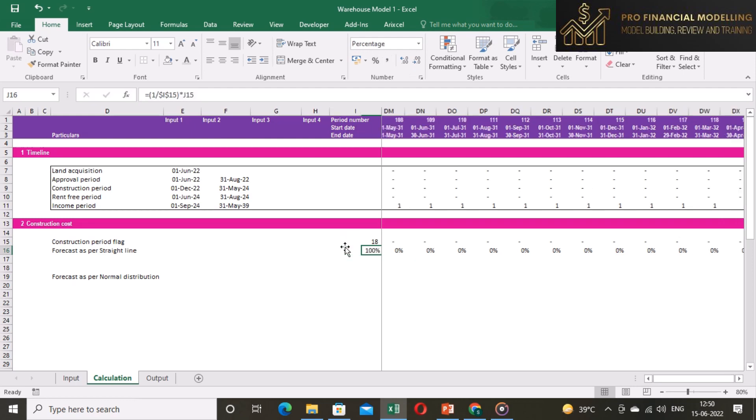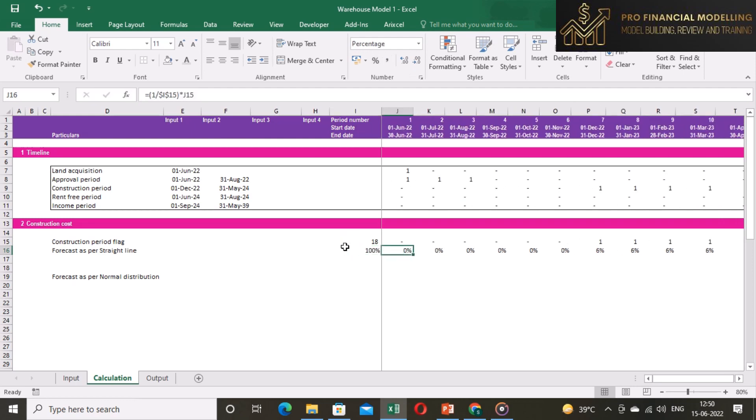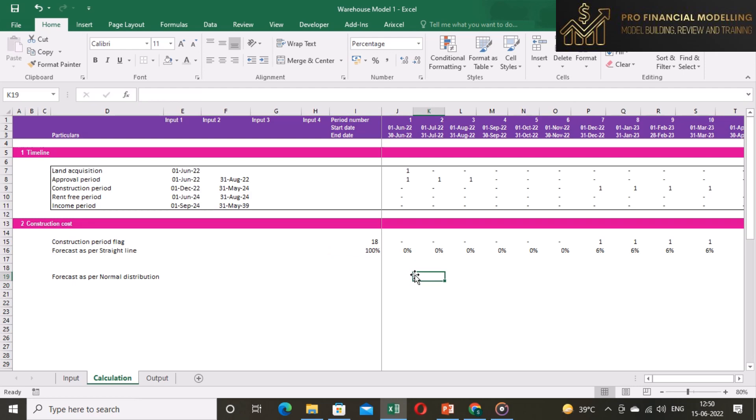Add the sum of forecast cost in column I. The sum should be 100%. If it is not 100% then we are making an error. The straight line forecast assumes that cost will be spent equally in construction period.